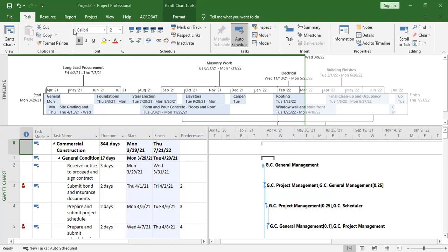So we're going to do it practical. Then you say, set it as a baseline. Update the percent complete of each activity. Then after that, you can now do various analysis. You can generate different reports. Yeah, so we're going to do it quickly.